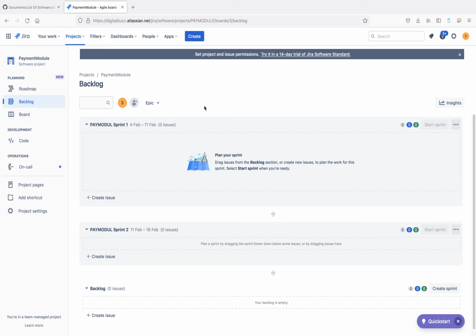So you have to first identify how many modules there will be and which module depends on another module. You identify the dependencies, and based on that you create multiple sprints and start assigning tasks in each sprint.